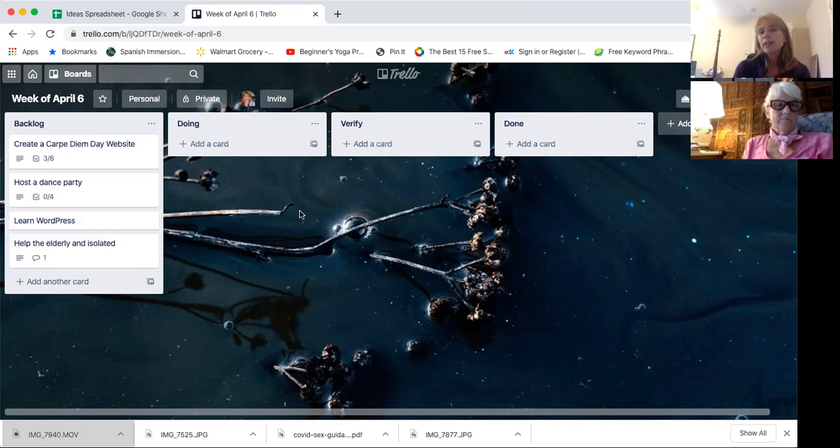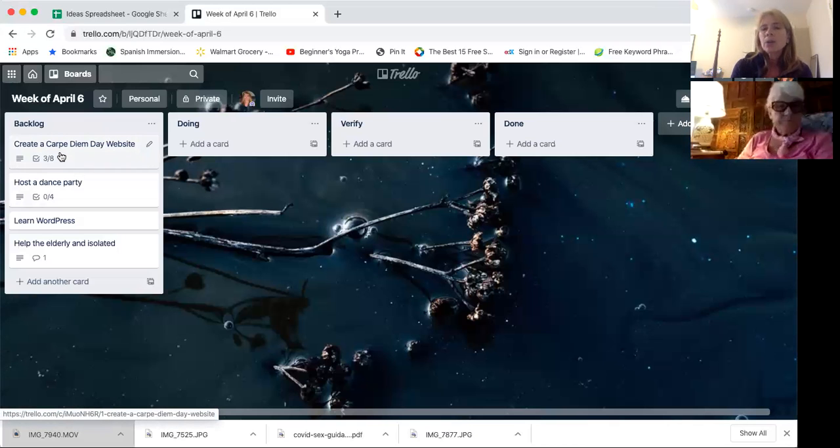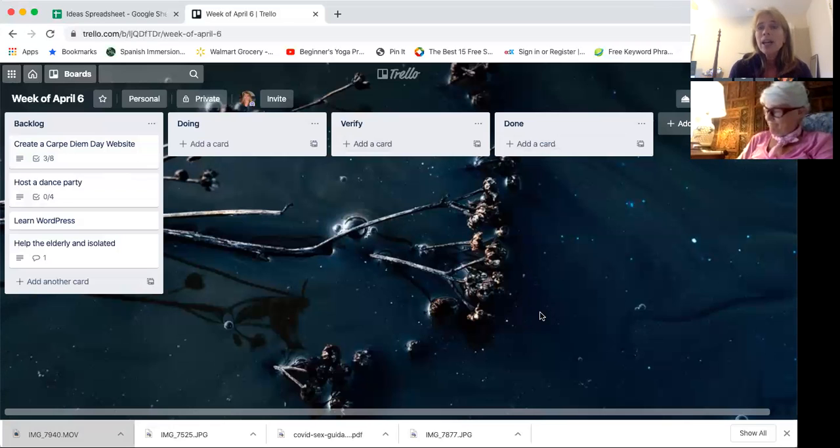Now, again, there will be a lot more detail when we're creating these descriptions, to make sure we define what it means to get to done. That's called the definition of done. And when something is done at the end of the week, what we want to do is a demo to our accountability partner and show them that we did all these different tasks, and now we have something of value that we can feel proud of and get feedback about. And then we go on to planning our next week. Any questions?